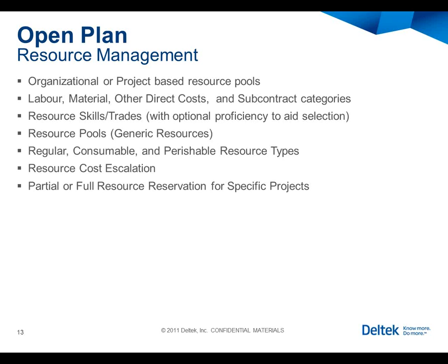The resource pools can be defined from a specific level all the way up to generic resources. And those resources can be defined as either a regular or normal type resource that's extendable, and then you have consumable and perishable resource types.